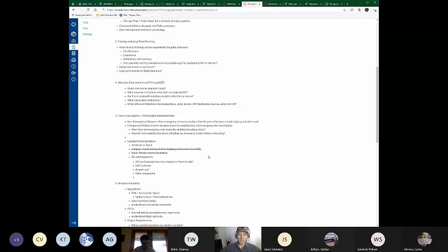So, for example, I was mobilized to the Bighorn Fire in Tucson last year to be part of a UAS operation. So I bought my airfare, I traveled to Tucson, I stayed at a hotel, and that was where I was based. Now, when the incident commander requested the UAS to be operated for a particular day, then there's a second set of travel logistics. Then I have to coordinate with my UAS team. I have to figure out where we're going to fly from. I have to figure out what our flights for the day are going to look like. All right, so there's a mobilization, and then there's the response.